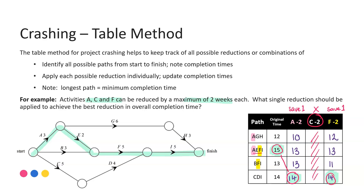So what is the best single reduction? We have the option of either A or F, and both of those will save us just one unit each.